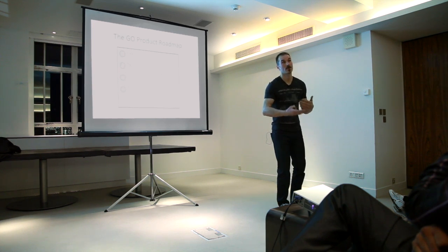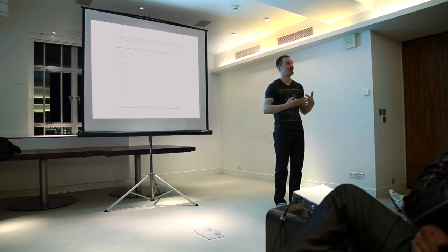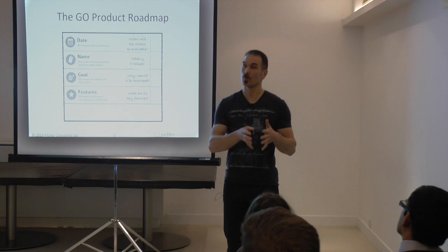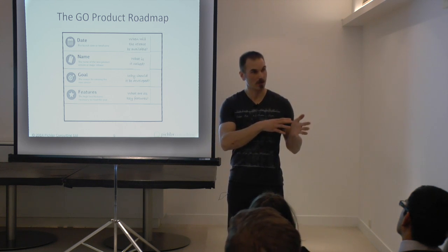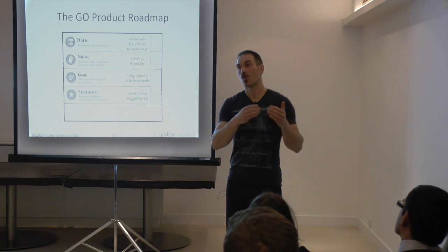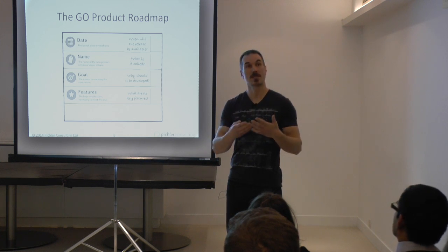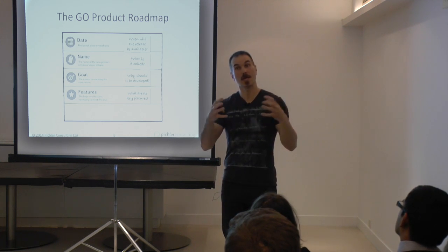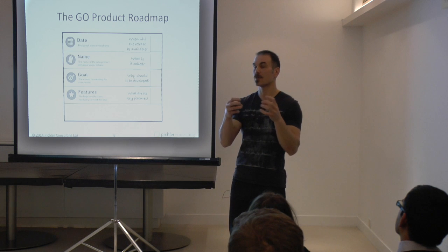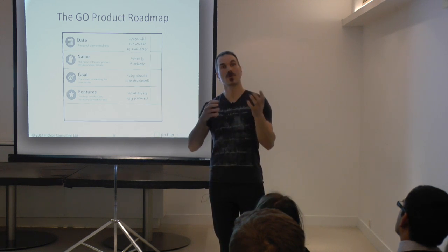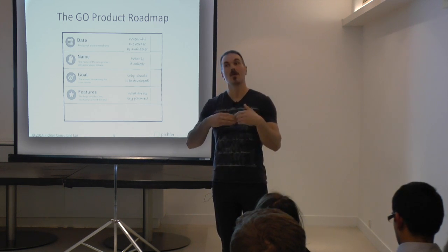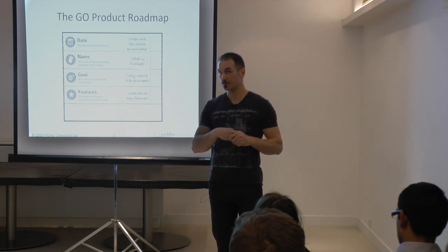So whenever you have a roadmapping discussion or session, I would suggest that you first and foremost focus on the goals, and once you've agreed on the goals, and once you've established shared goals, and the goals are coherent, they make sense, so that each release is connected to the previous and the subsequent releases. Then think about the features.